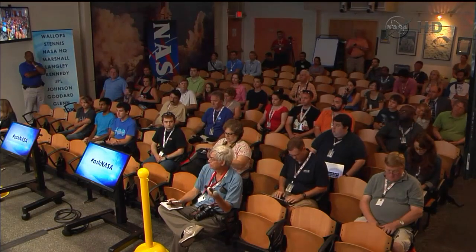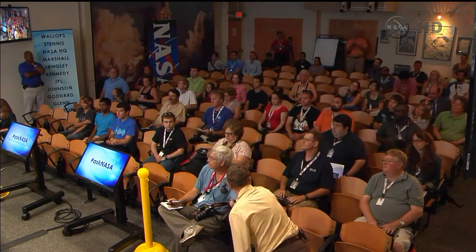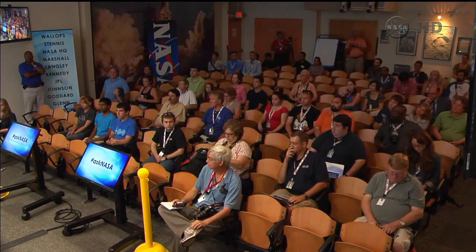Thank you. I can take a stab at that. As you know, we had a failure in acceptance test of one of our engines, engine 17 was the nomenclature. That obviously sparked a very thorough investigation led by Aerojet Rocketdyne, our engine supplier, but supported fully by Orbital and a lot of help from NASA and some of the various NASA centers and specific expertise that they brought to bear. That was a lengthy process and the primary source of the delay from the early part of June to where we are today as we worked our way through that.